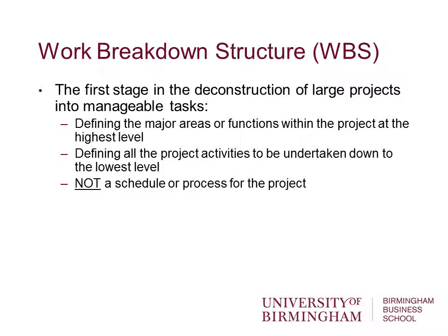All it's about is saying what are all the things we need to do in order to deliver the project. So that's the question which is being asked. We've got a scope, we need to turn that scope into some sort of series of tasks. How do we do that? What do we need to do? Okay. Later, those tasks will be arranged in some sort of schedule or logic. But at this stage, all we're doing is creating some sort of structure to try and pick up as many of the tasks as possible.